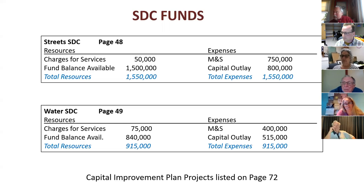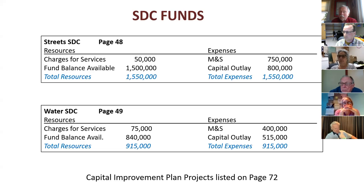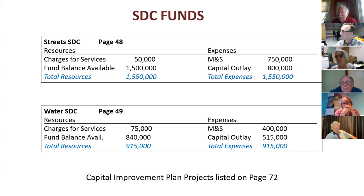To expand on that — it depends. Some projects that are grant-funded have a local match requirement that we build as in-kind, included as part of the grant. Other projects have an indirect cost allocation that we negotiate to capture some of the grant. Sometimes it's internal, sometimes it's in the grant, sometimes it's outside the grant. It really depends on the project, the amount of funding, and the likelihood of securing funding — a little different than what Steve was talking about with construction projects.